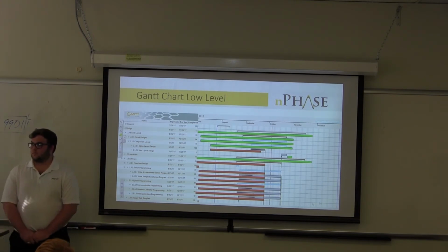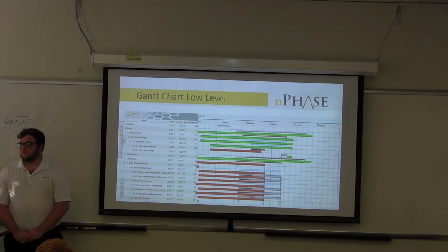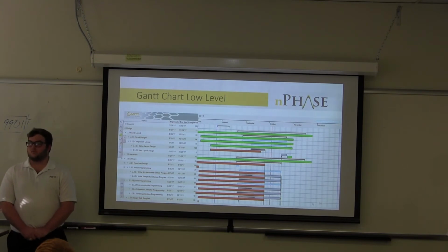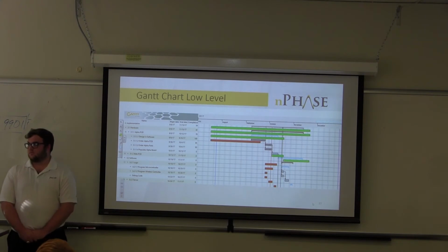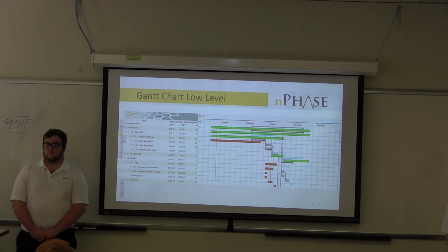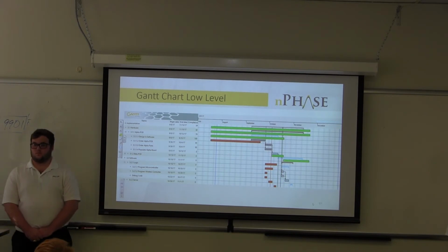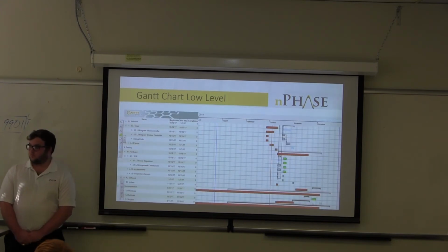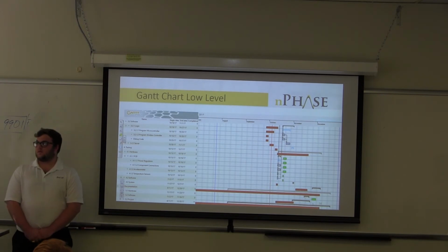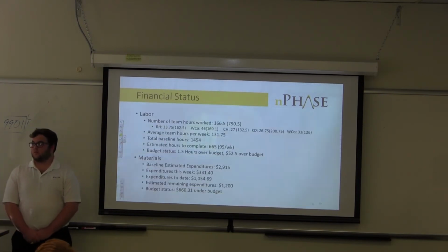We're behind in software, as we mentioned earlier. We're hoping to have that done by the 17th to 18th. We've already ordered our alpha PCB and the parts, so we're just waiting for the PCB to come in, and we'll begin populating that. Documentation is a bit behind because it was pushed back by the software. The software is part of the critical path.